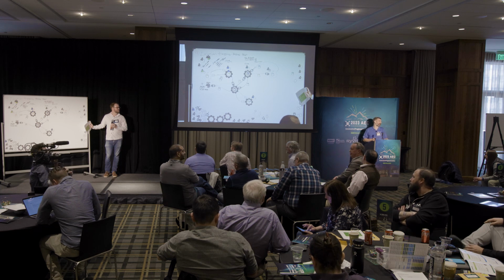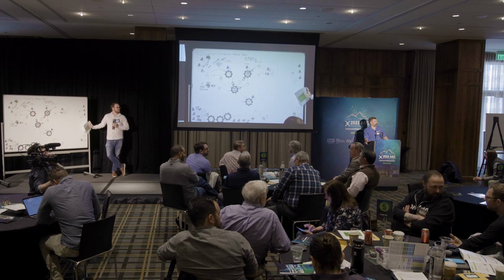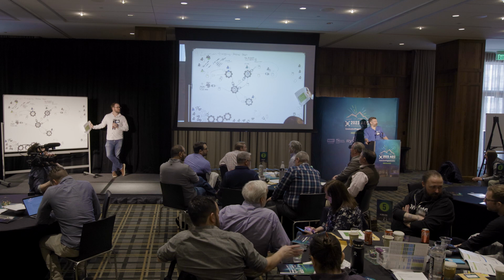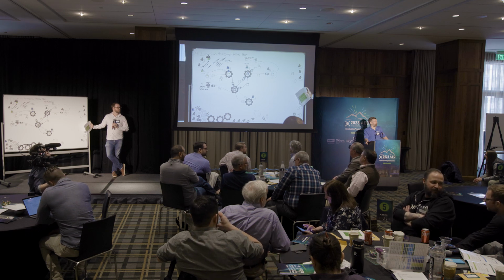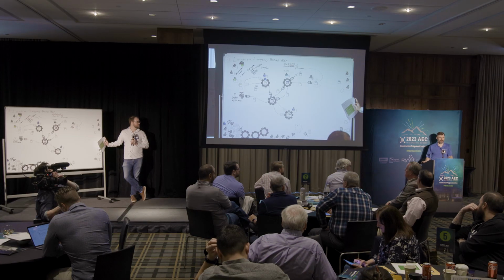Yes. One of the lackings that we have right now, if you're just using a room number or you've made a cloud on a drawing, or you've indicated that something is happening on the north side of the building, that's not information you can analyze spatially. You can't determine that there seems to be an issue on every floor in the northwest corner related to a particular system that keeps penetrating in the wrong area. But if you can actually codify this location into something that's analyzable, then you have the potential to remove those hundreds of RFIs that come up because of the same condition that keeps occurring. So it's digitizing this location, not just having it be parameters in a checkbox list somewhere. That's our word of the day, location codification.